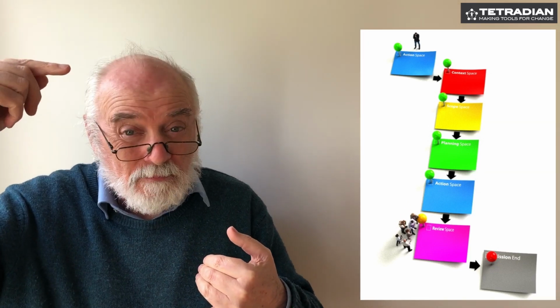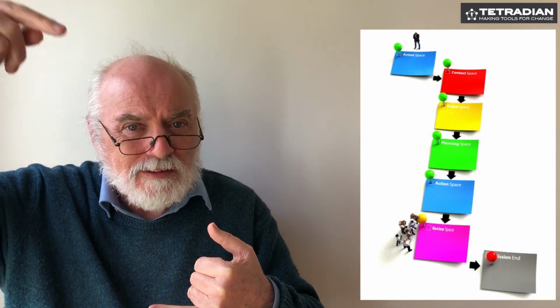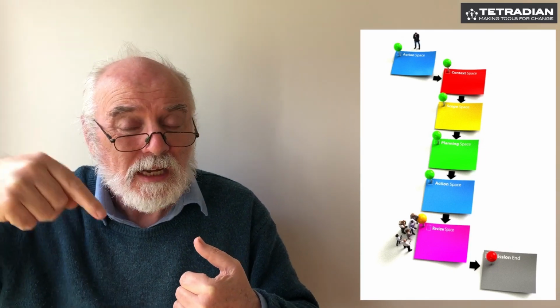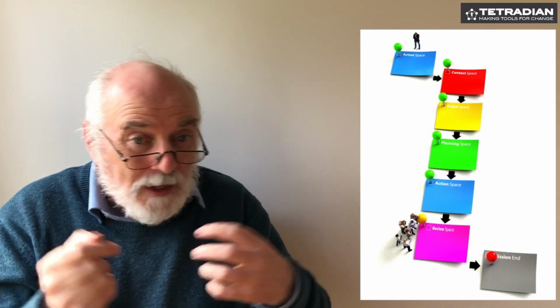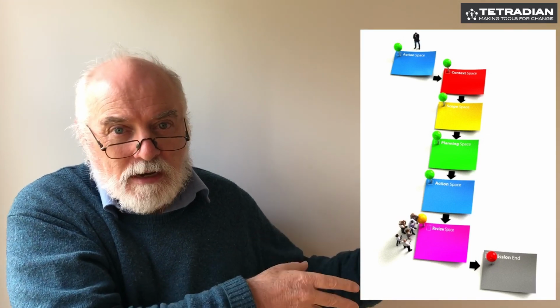Once the action is over, we need to do a review. We need to assess whether benefits were realised. The benefits to realise are going to be identified in the context, the scope and the plan. But for the benefits realised in the action, we're going to need to check back against all of those phases to make sure that we did actually do what we intended to do. And if there's a variance, which is where the lessons learned comes in, then look at the variance, look at what worked well and what didn't work well. Look for all of that information about what we need to change. And the distinction here is between not just someone needs to change, but what will I do personally? What will we do as a team differently next time? What will we commit to learning to do differently next time? So that we're ready for the next time round.